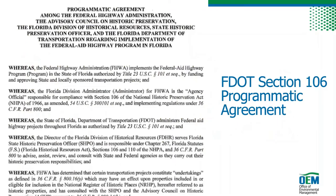The FDOT process for compliance is implemented through the Section 106 PA, which contains three programmatic processes. Stipulation 7 is the normal four-step Section 106 process just described, for major transportation undertakings with standard involvements with cultural resources. We also have two programmatic processes for projects with only minor involvements. If your project qualifies, you can meet compliance standards through minimal background research and no — or very little — field survey. Relevant information is recorded on forms emailed to DHR, and if they don't object within 30 days, your project is compliant and you can move on.